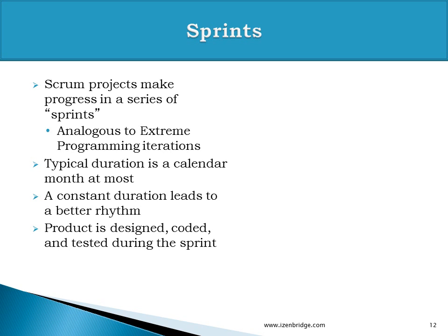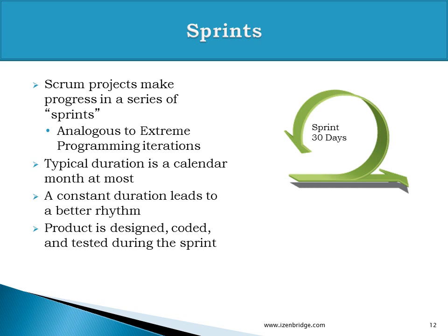In a particular sprint, the product is designed, coded and tested in that same sprint. It is not that we are only doing a sprint for exploring the requirements and in the next sprint we are going to design or develop it. It is always recommended that we design, code and test the increment of the product during the same sprint.